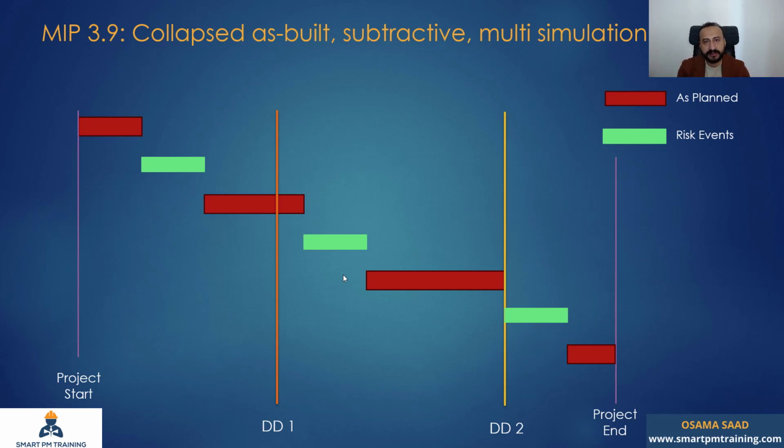When you develop a baseline, you develop the logic, then the facts will come later. So when you do so, maybe it's not practical, so you cannot really fix the issue on the spot and continue the analysis. As a best practice, you have to make the changes and fix the logic problems, then redo the exercise from the beginning, go back to the first window here, remove the delays and collapse back to the baseline. So sometimes you really need to redo the exercise more than once because you will potentially have some logic problems.